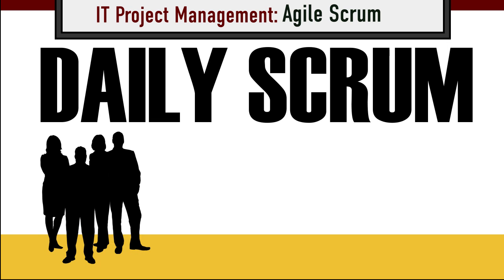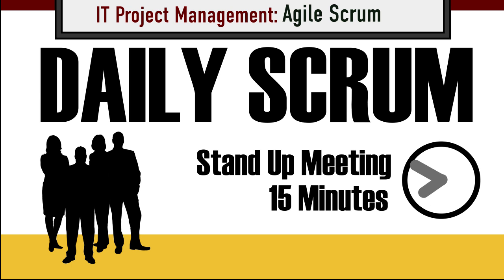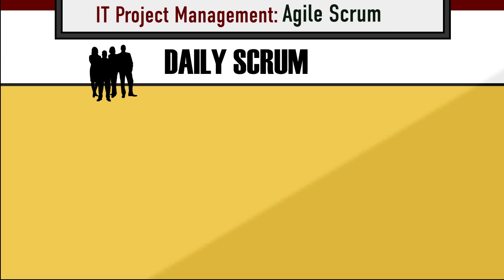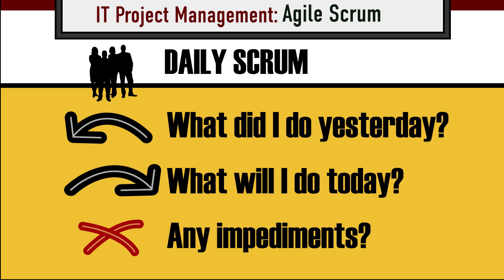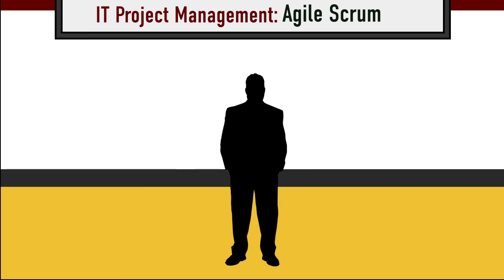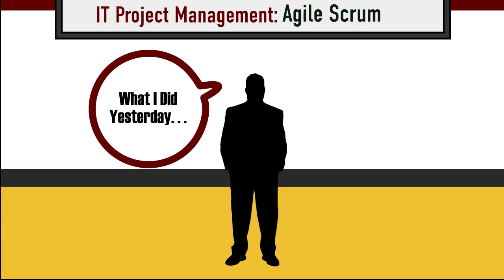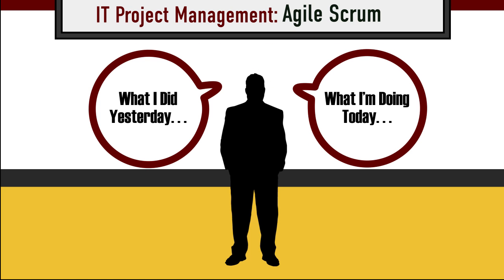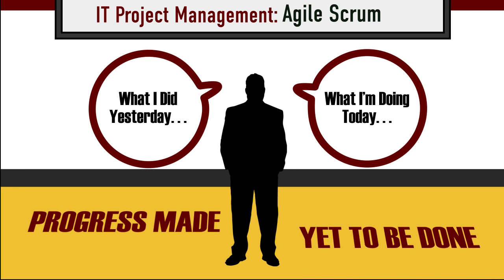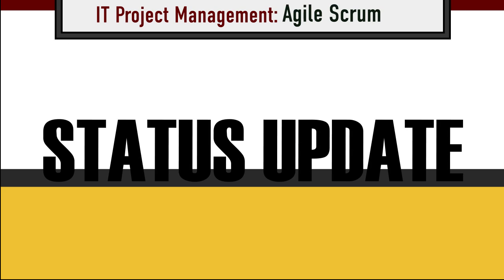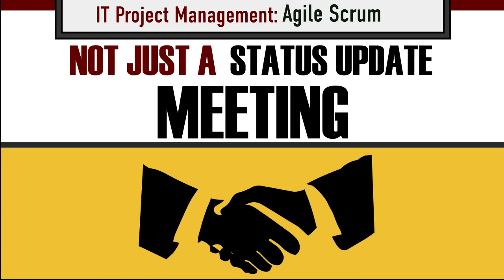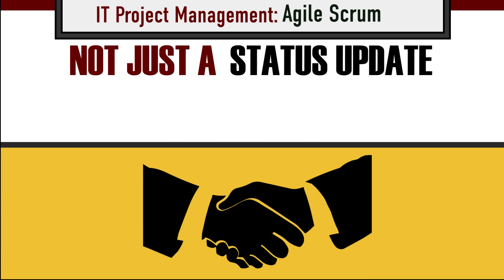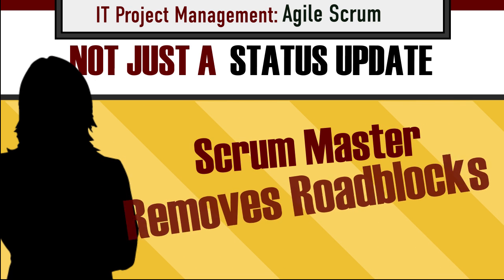The daily Scrum is usually a stand-up meeting that lasts approximately 15 minutes. During this time, each member of the development team answers these questions: What did I do yesterday? What will I do today? And do I see any impediment in my way? By listening to what each team member accomplished yesterday and what they'll accomplish today, the team learns what progress has been made and what work is still outstanding. The daily Scrum isn't just a status update — it's a meeting where team members make commitments to each other. If any team member has a roadblock, it's the Scrum Master's responsibility to handle the problem.